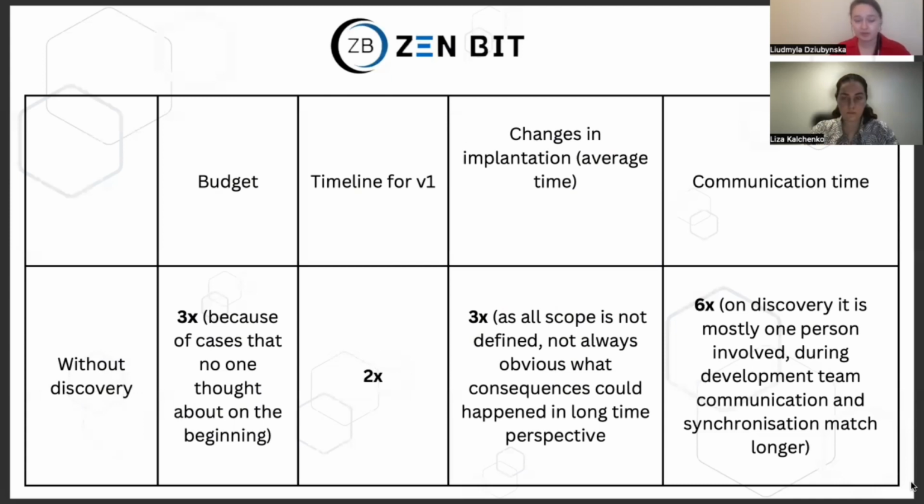But again, when you think ahead and do discovery, you have 3 times fewer change requests than without discovery. It means that again, it's time, and changes in the code are always, as I said, more difficult than doing the changes before the code is set up.